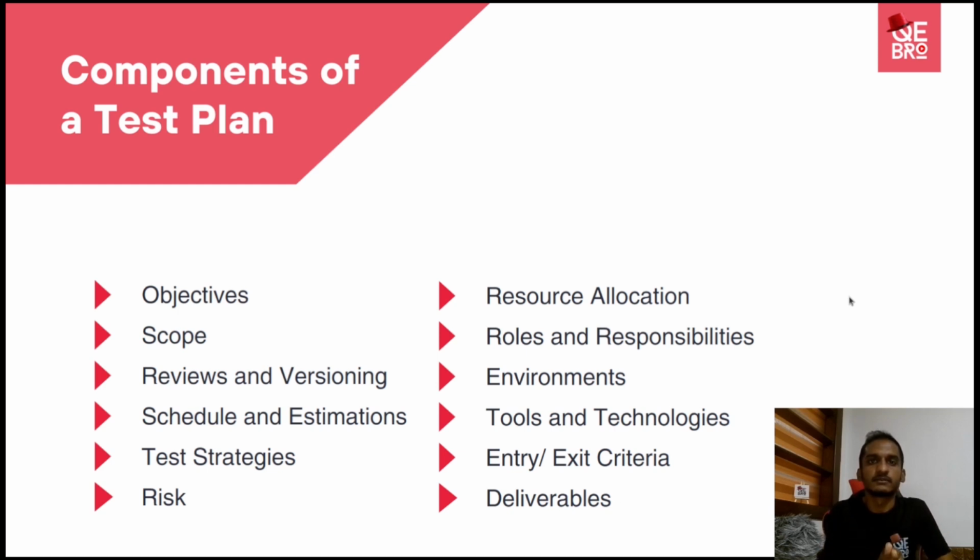and now they can take some stats and compare them with the exit criteria, whether all the blockers and criticals are fixed, whether 90% test coverage was achieved or not. Based on those details, you can make a clear decision whether to go live or not. So that's why entry criteria and exit criteria are very important.